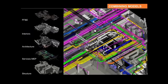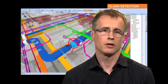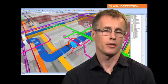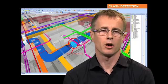What you see here is a combined model for Liverpool Hospital. There are essentially five discipline models here. FF&E interiors and architecture, which are being done by Rice-Daubney. MEP services are being done by the D&C subcontractor All Staff and structure is being done by SCP, the structural consultant. So all those models are combined together and you can see how complex this image is because hospitals are very complex buildings. We can use that model for clash detection. Essentially because everything's spatial in these models, everything understands where it sits pretty much exactly in the world. You can run this program and ask it to show you all the things called pipe and all the things called duct and where they physically inhabit the same space. And that's a clash. This software will pick that up automatically and we can then deal with those clashes. In this case, I think it says that we need to move the pipe up 25mm.